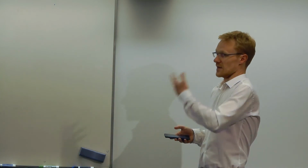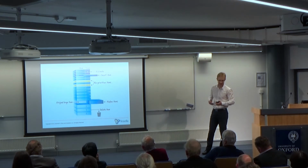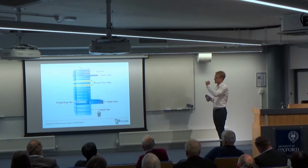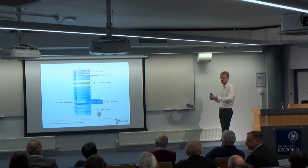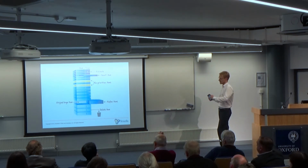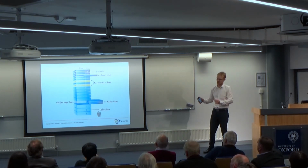But in Agile, you have a backlog. If you remember the diagram from the beginning, the product backlog, where you can prioritize. That's how we vary the scope. So you're going to have the really important stuff at the top, the high priority items, and then you can change that scope. You can insert items, you can delete some, you can refine, reprioritize. So you need to have this constant communication with the customer to be able to say, well, this took a bit longer, we're not going to be able to do that bit. Or do you want to add something new? Yes, you can, but that means you have to remove something. You have this negotiation, contractual thing going on there.